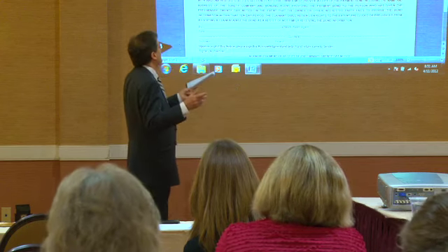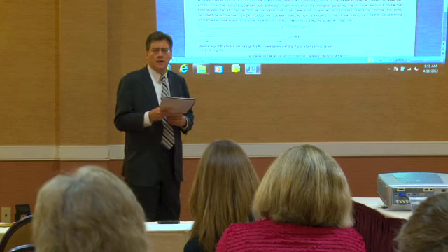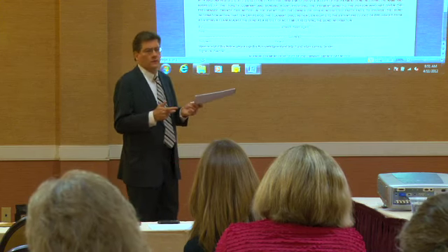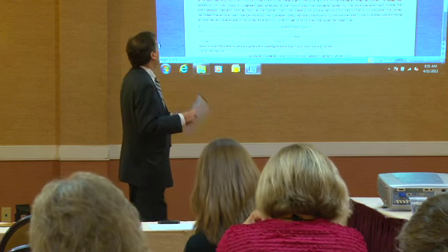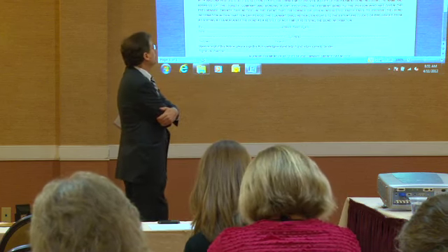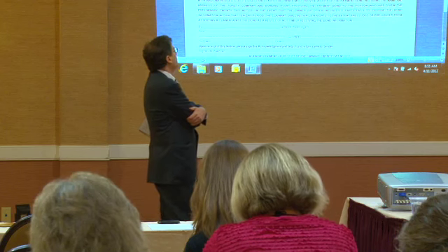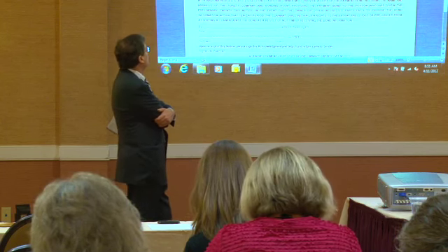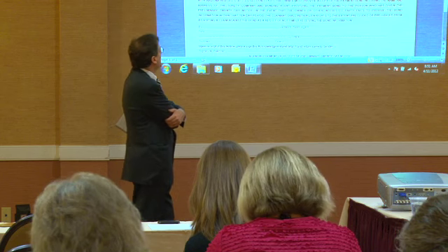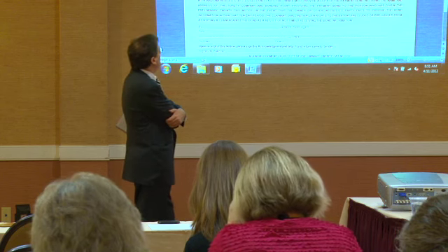You know, let's take a second and read this because, frankly, it's something you're never going to read otherwise. So let's do it right now. Notice to property owner. If bills are not paid in full for the labor, professional services, materials, machinery, fixtures, or tools furnished or to be furnished, a mechanic's lien leading to the loss through court foreclosure proceedings of all or part of your property being improved may be placed against the property.